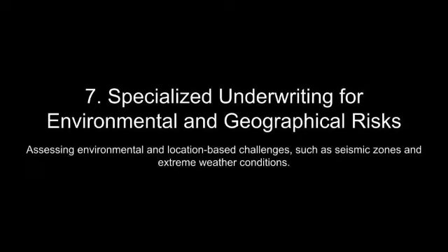For instance, site visits can reveal issues such as poor equipment maintenance, insufficient workforce allocation, or unsafe working conditions, each of which could lead to delays, cost overruns, or accidents. During these visits, underwriters or their representatives may also engage with project managers and subcontractors to evaluate communication dynamics, adherence to schedules, and the resolution of on-site challenges. Site visits further provide opportunities to validate that materials and equipment are being appropriately utilized and secured, reducing risks related